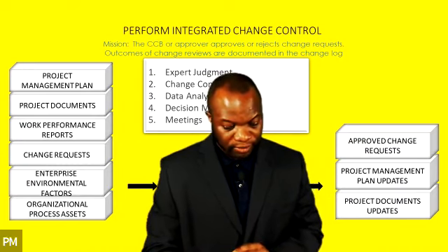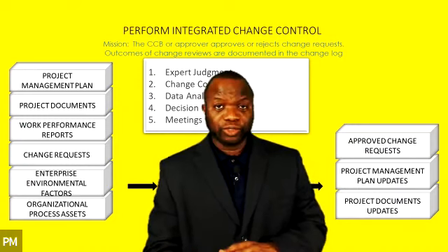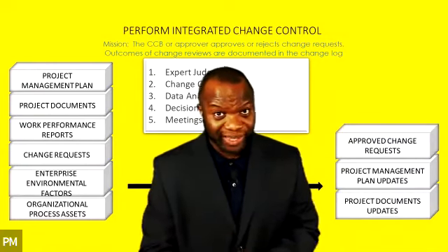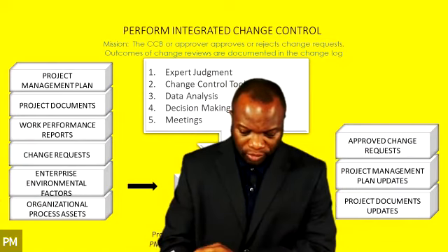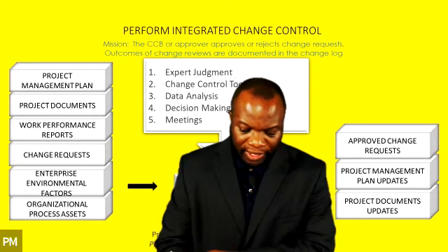See that? That is important information to consider. Even if someone gives you a verbal change request, you want to say, hey, can you fill in a change request form? Then you want to document that stuff. That's what they're talking about. It's important.